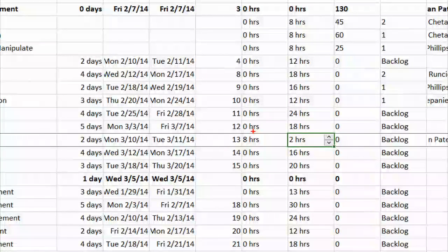So the key is there are some synchronization things that can happen, but right now, at least with this connection, we're not moving that into a timesheet view, meaning we're not storing it as a timesheet period. It is tracking the actuals. It's actually who actually did it. So your reporting database, your draft, your public database is all being updated, but we're not calling it out as a separate timesheet bucket.